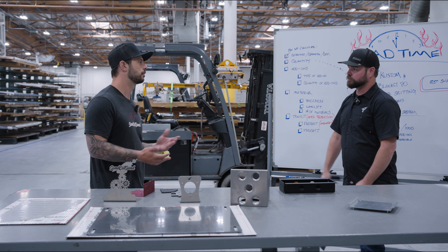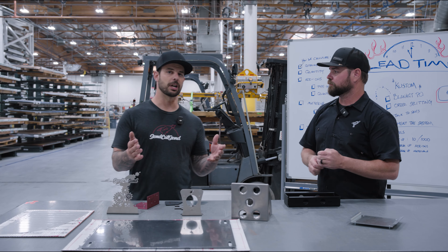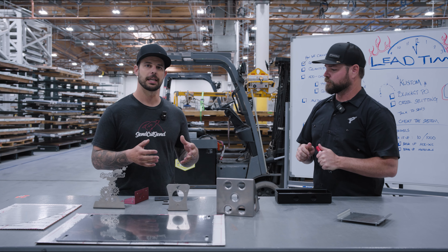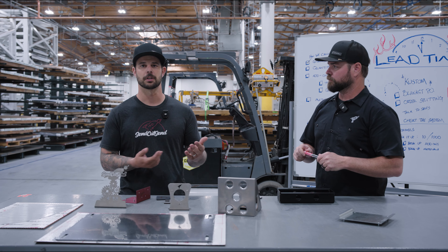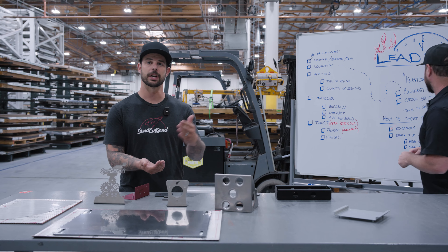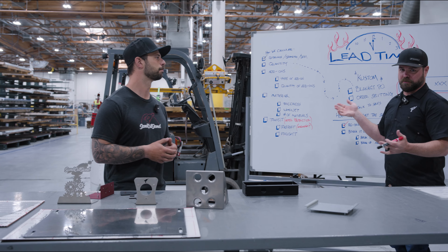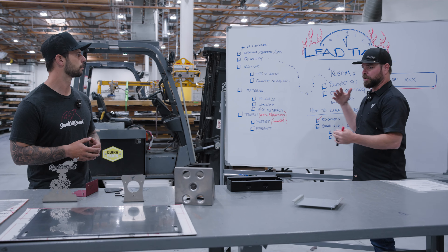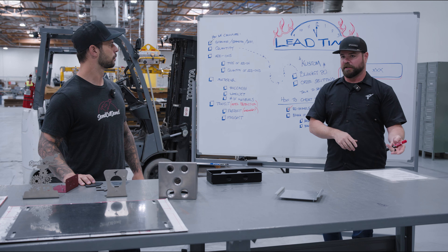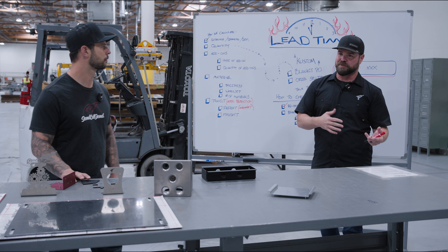Quantity: if you do want 10,000 parts, sometimes what we can do — and you can work directly with our sales team — is break up those orders. Maybe we do releases of 1,000 at a much quicker pace than doing a 10,000-part job at one time. We call it a blanket PO or blanket purchase order. It might be better to send you 1,000 units a week over 10 weeks, versus waiting a few weeks to get all 10,000 at the same time.